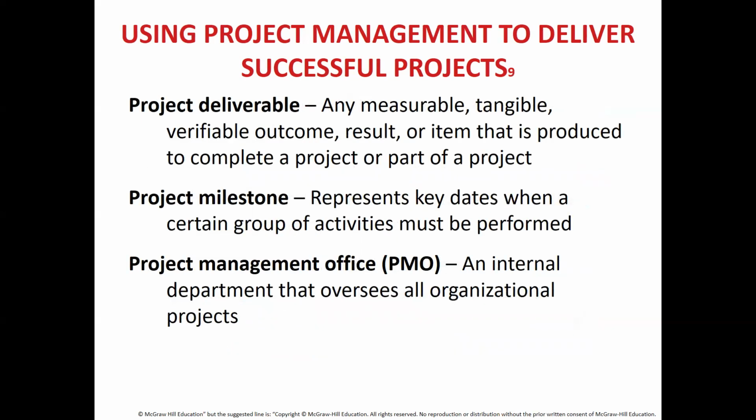Now, project deliverable: a measurable, tangible, verifiable outcome, result, or item that is produced to complete a project or part of a project. Now, you have phases, 7 phases, let's say project planning. So in project planning, the deliverable is a business case. The overall deliverable is the entire project. So within the phases, you have mini deliverables as well. These deliverables are part of a project and give a measure as to where the project is heading.